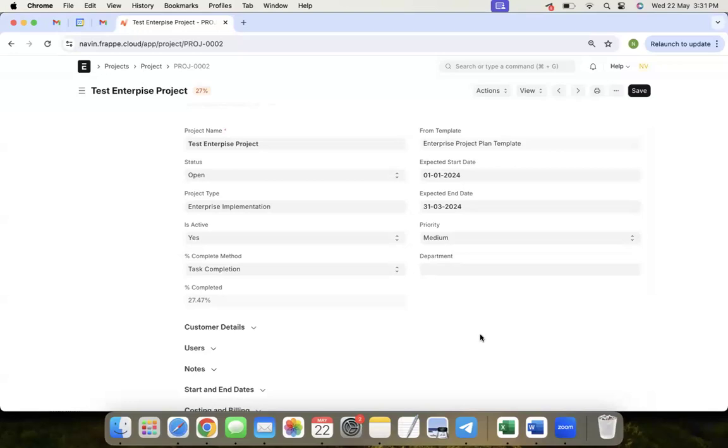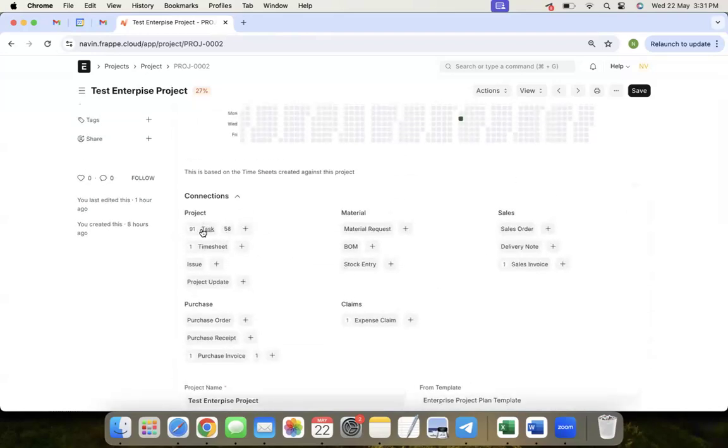Okay, so you mean to say whenever you change any task timeline in between, that impact should be replicated for other tasks also, right? Yeah, normally if some task depends on this task, then the other task will also get delayed. Right now we don't have that functionality, but we are checking the parent level timelines. Just now you saw that I created another timeline for the child task and it is not accepting, because the parent timeline is different.